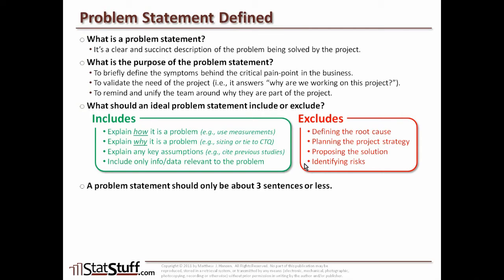When you're doing a problem statement, I strongly recommend you keep it very brief — only three sentences or less. Ideally, if you can get it down to one sentence, that's ideal, as long as you're following all the other inclusions and exclusions. If you need more context or more background information, I like to create what I call a background statement. Let that background statement be something that's separate, layering the context to define maybe key terms, key expectations, or processes within the business in order to lay down the proper context for the problem statement — only if it's supporting the problem statement and you think it's critical.